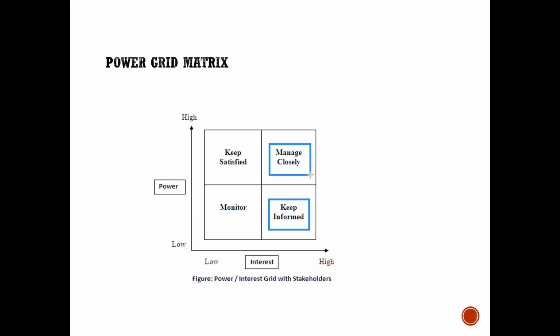Yes. You have to engage with them on a regular basis. If on a particular day, as a surprise, you go to them and say you need an approval for this hardware or this additional money, they won't be able to do it. So it requires constant engagement with them. They should be constantly updated on how the project is proceeding.